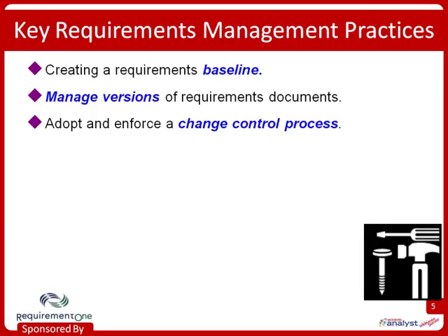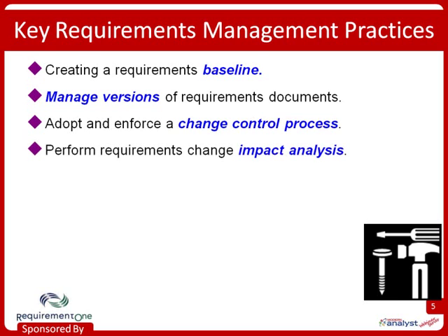So what we need to do is build into our projects and into our culture and negotiate with our customers so that they understand the need to have a structured process that we can use to anticipate and accommodate change, not to prevent change, but to make sure that changes that come along don't disrupt our project to the point where we can't succeed. An important part of that change control process is to do some impact analysis before we start making commitments so we understand the consequences of agreeing to make a particular change that someone has requested. And I'll be talking about all of these as we go along.